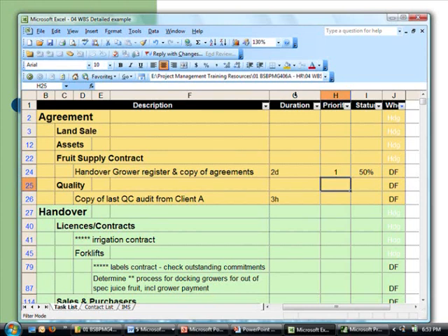This was just one, and I had to take a lot of that sort of thing out because there were comments and things in there that would have enabled you to identify what the project was. So you're happy that you could actually identify the tasks, that you could write the list of people that are going to be your stakeholders and allocate them to the tasks, then do an update very basically, say where you are with it, and then filter on it and find out who's done what when, and then understand whether their tasks are up to date or whether they're on schedule within the timeline you've given them, or whether you've got to do something about it.